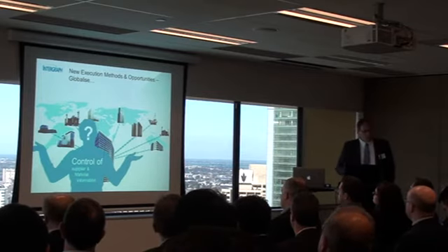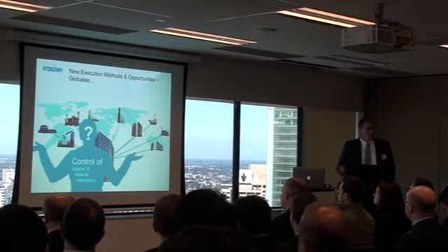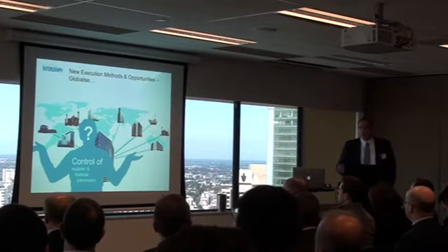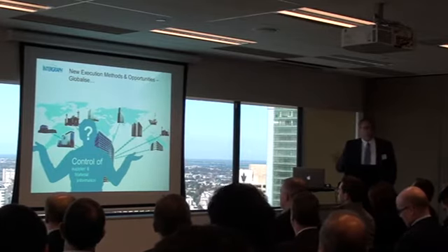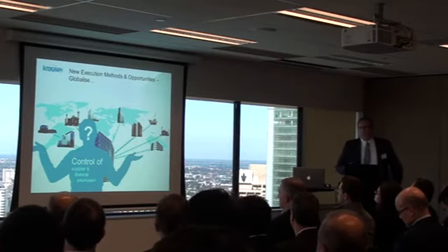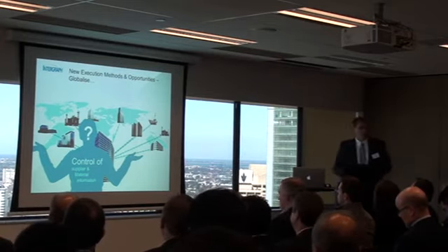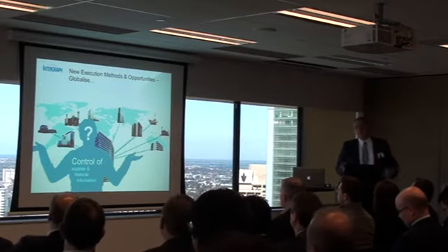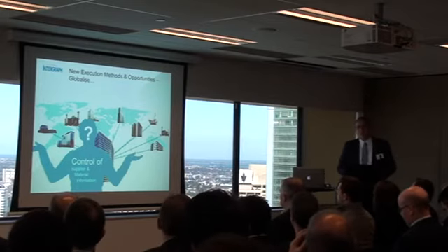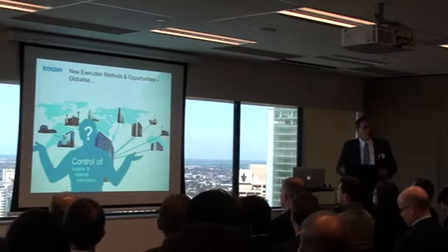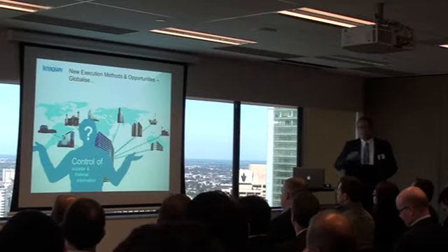You want to put this in a database with a user interface on top of it, and then have the MTO, and then summarize the MTOs. Hey, we need so much material now, we need so much material then, and so on. It also enables you later, if a change is coming in, to compare. Suddenly you can compare MTOs. Forget Excel. Now it's this much more, this much less.